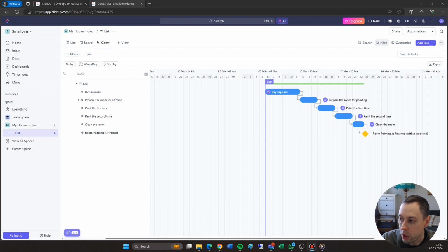The second thing is that you're able to plan way ahead and understand, when you're doing a task, what you need for that task and when you need it. So this is very convenient if you're planning, let's say, some other specialists coming into your house. So let's say you cannot add some furniture until the painting has been finished. Here you can monitor whether you're staying on schedule and plan for those other teams to come in at a specific time. And in case there are changes, you can inform them in a timely manner and reschedule.